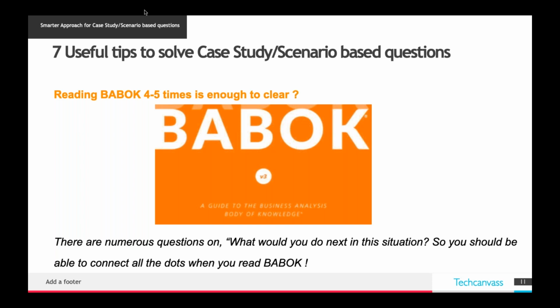We'll try to complete other user stories in that particular sprint, and then we'll work on this user story during the last sprint, or on the 13th or 14th day. But that is what happens in the real world. As per IIBA, whatever is so tough, whatever is technically complex, whatever requirement is not clear, you have to work on it first, and IIBA wants you to take it up and then fail.